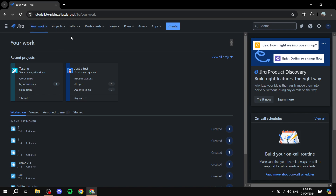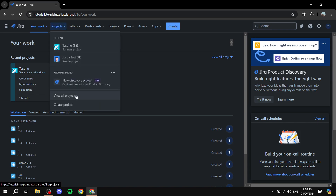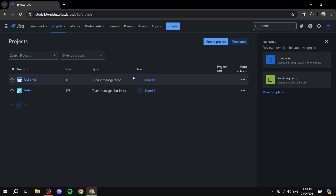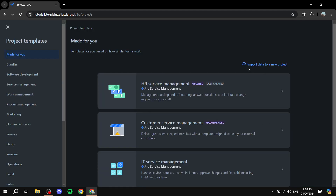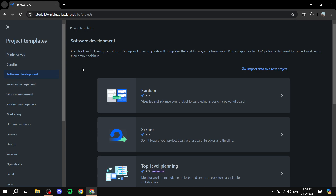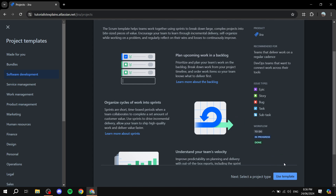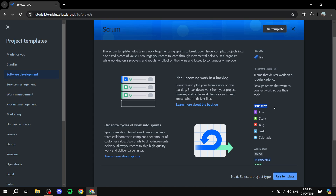Now that I've signed into Jira, I'll create a new project to show you how to work with user stories. Going to 'View All Projects' shows the list of all your current projects. I'll click to create a new project, select 'Software Development,' and choose 'Scrum' for sprints. You can see the issue types that come with this template: epic, bug, task, subtask — and most importantly for us today, the user story.